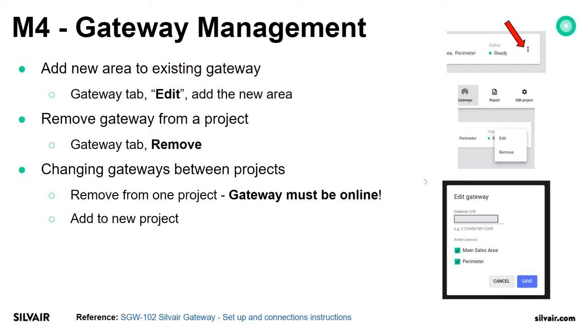The most important thing from here is that for changing gateways between projects, you would need to remove the gateway from one project, not physically remove, but through our web platform. Remove the gateway, and to avoid any errors on the device, the gateway should be online.